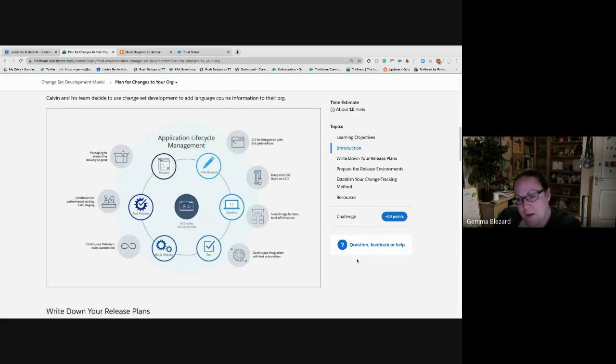And it means that once that individual person has built that functionality, someone else checks it, they have a discussion. Ultimately, when they're happy that it works as it should and that it meets the requirements, internally, then they're ready to release it to be tested. And that's the first part of the life cycle where a sample of your end users will get to see what you've built and test it.